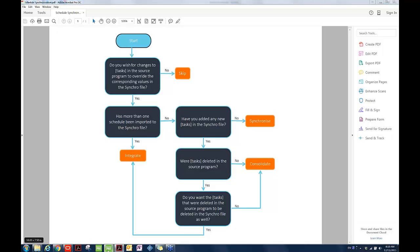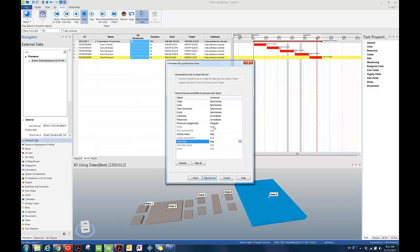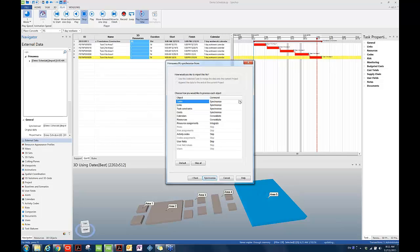So let's go back to Synchro. So now we can see we can probably skip all these options. They were not originally brought into Synchro, and they're not even contained in the P6 XML schedule, in the P6 schedule. We can use Synchronize for most of the attributes here, because we want to make sure the changes will be brought into Synchro, while we also want to maintain the resource assignments as much as we can, as long as the task is not deleted. And then we also want to keep visualization work.